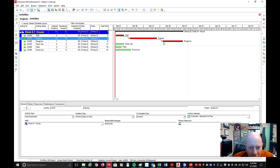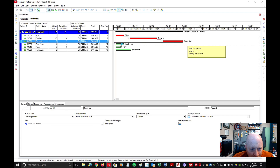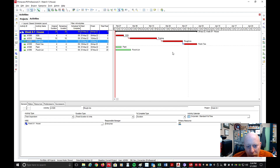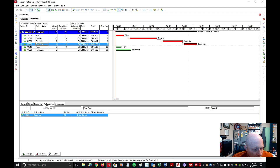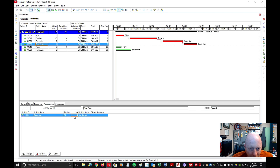Now I want to do a start-to-start with Finish Trim. But let's say I accidentally did a finish-to-start and hit Schedule — it pushes it out and I meant to do a start-to-start. If I click on Finish Trim, I can click on Predecessors down at the bottom. It shows Rough-Ins with a finish-to-start relationship. If I click on that relationship, I get a dropdown where I can select finish-to-finish, start-to-start, whichever one I want. I'll click SS for start-to-start, and then I can type in a number of days for a lag.